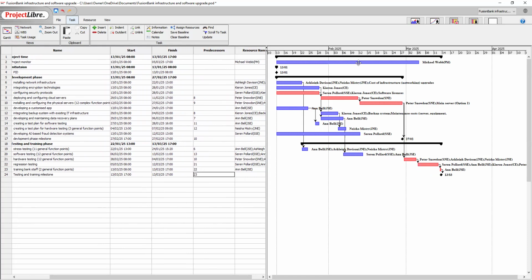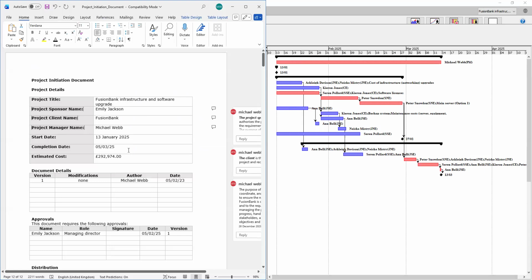Now remember, our monitor should be the same as our timeline. So we're going to put that at the 13th. All right. Therefore, what's going to happen? All our prices and the completion date, we have to update our PID on the completion date. So we're going to update our PID on the completion date, which is now 13th of the 3rd. And it's just because we did not do our regression.